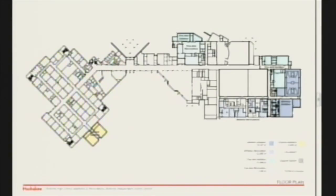Anybody else? So in order to meet the bond budget and get all the other needs in there, this was just one of those extra items where we certainly want to do it if we can afford it, but we want to make sure that we get all of the primary needs that the programs needed in there first. So do you bid that as an alternative during the bid process? Yes, that's the plan.